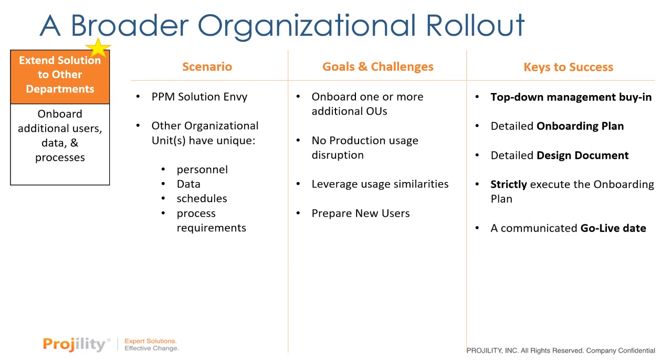The second thing that you're going to want is a very detailed onboarding plan. This onboarding plan is going to have things like we're going to schedule our requirements gathering sessions. We're going to list the people and the SMEs who are going to participate in those onboarding sessions. Keep in mind that these onboarding sessions may be subject matter specific.